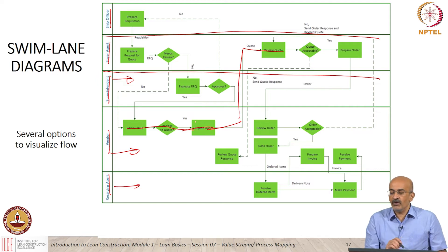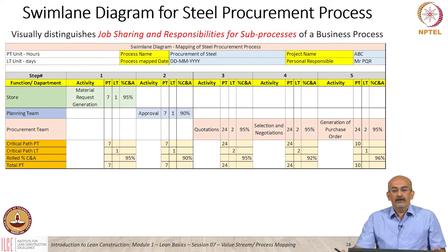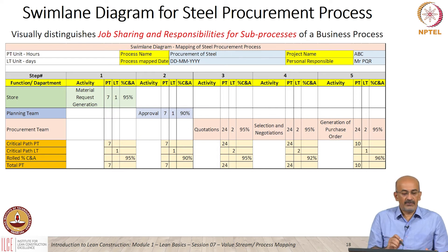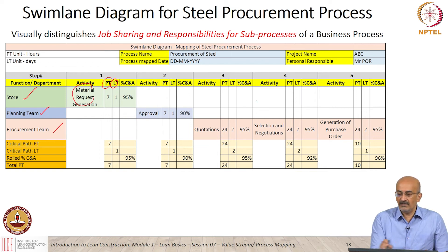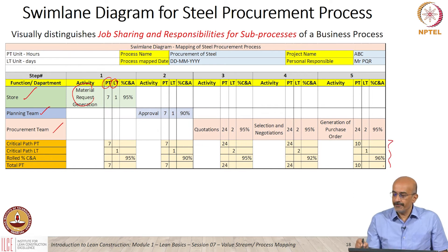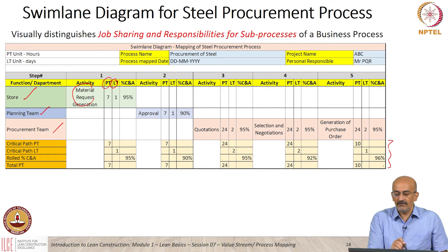This is also a very popular tool used for visualization and brainstorming. Here is an example of a swim lane diagram for the steel procurement process discussed earlier. We had the stores team, the planning team, and the procurement team as the lanes. All metrics — processing time, lead time, and activities — are represented in each lane. Using this, further metrics can be calculated. Swim lanes can be used with numerical notation so that we can quantify the process in more detail.